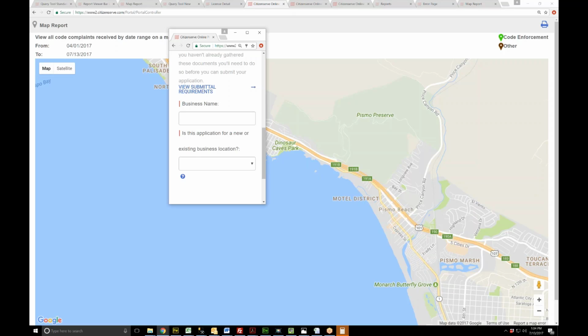Yeah. It also depends on your time frame. If you tell us we have to be live on this date, we're going to be live on that date. If your schedule is more flexible and you don't have strict guidelines, then it'll probably take longer because we'll go slower, we'll be more thorough, we'll spend more time on everything. So it really depends on what your objectives are and also your availability. You have an active role in the setup. You review things, you provide feedback, you answer questions. So if your staff is highly available, we're going to move much faster than if your staff's not highly available and we're waiting for questions and things like that. It's a lot of variables.